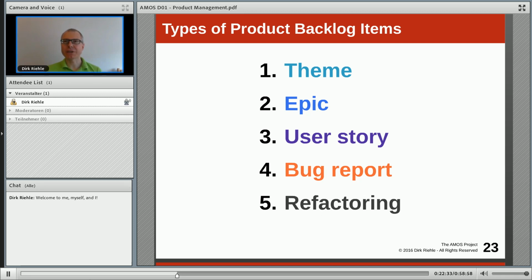And the main benefit of keeping code clean, having a well-factored, well-done software system, is that you can more reliably estimate the size and ultimately the effort that will go into implementing new features. So without a clean code base, you will not be able to do good estimation.